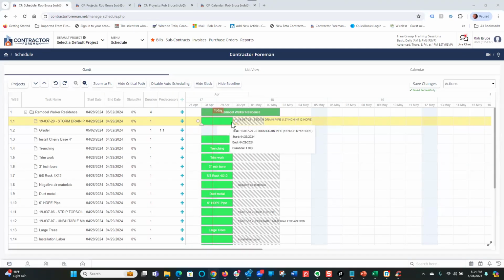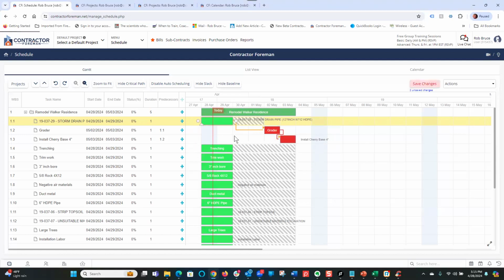So now that we're back at our CPM Gantt chart schedule, let's cover a few things on linking tasks, and then we'll get into more of the details within each task, things like that, in a bit. So moving more and more into the finer details. So I'll just cover that real quick. When you're linking your task, again, remember, you put your mouse over there, press and hold, drag it over to that one, and now we have those linked.